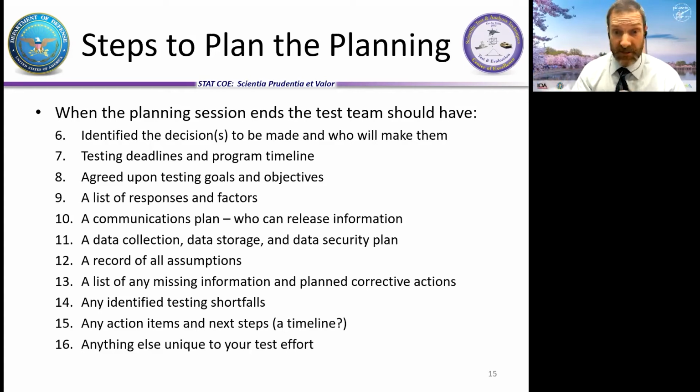A data collections plan, right? I've seen some excellent collections plans talking about how we're going to label our test results, right? So the day, the test, and what the factors were. So come up with a plan on how you're going to record your data, where it's going to be stored.